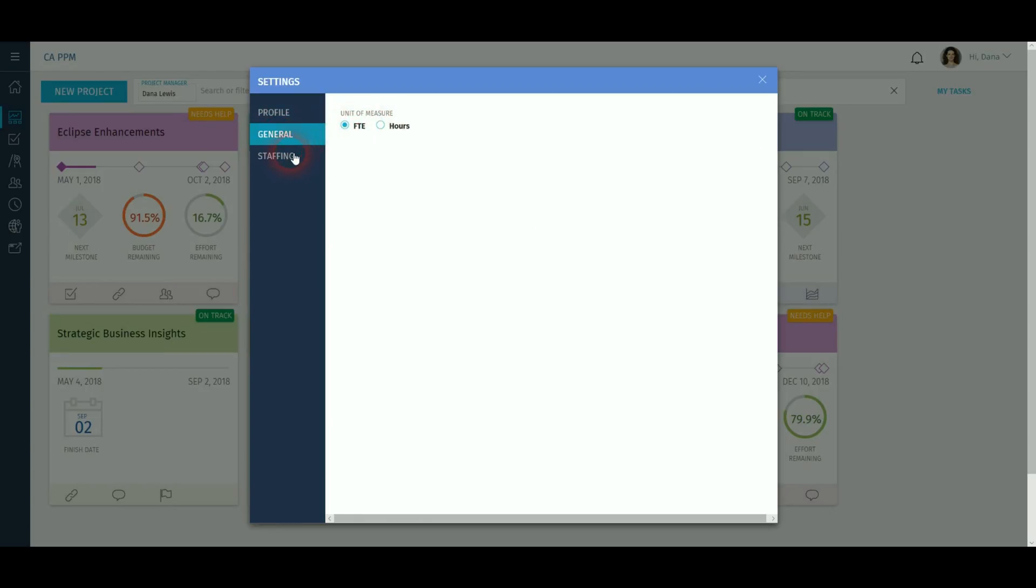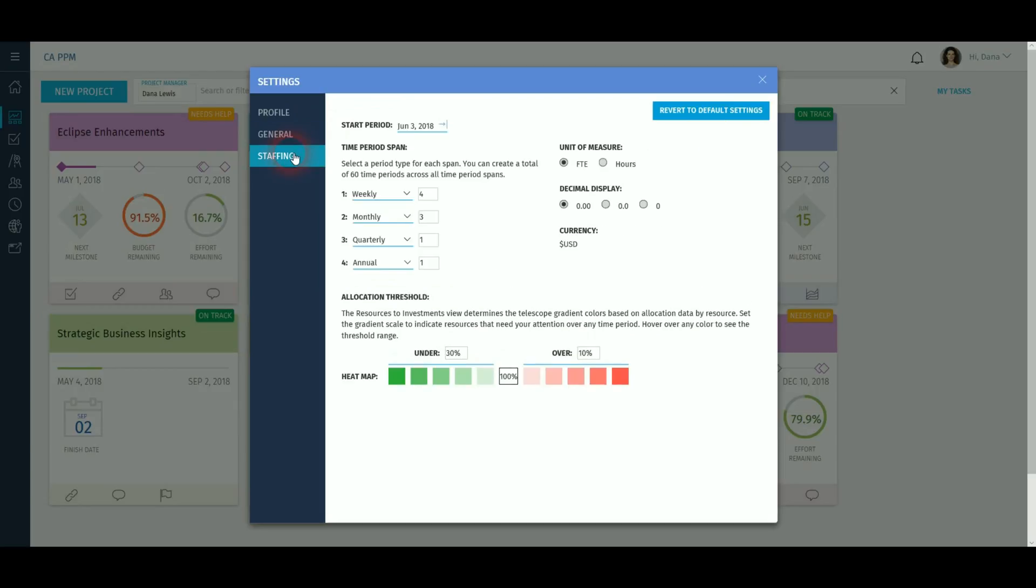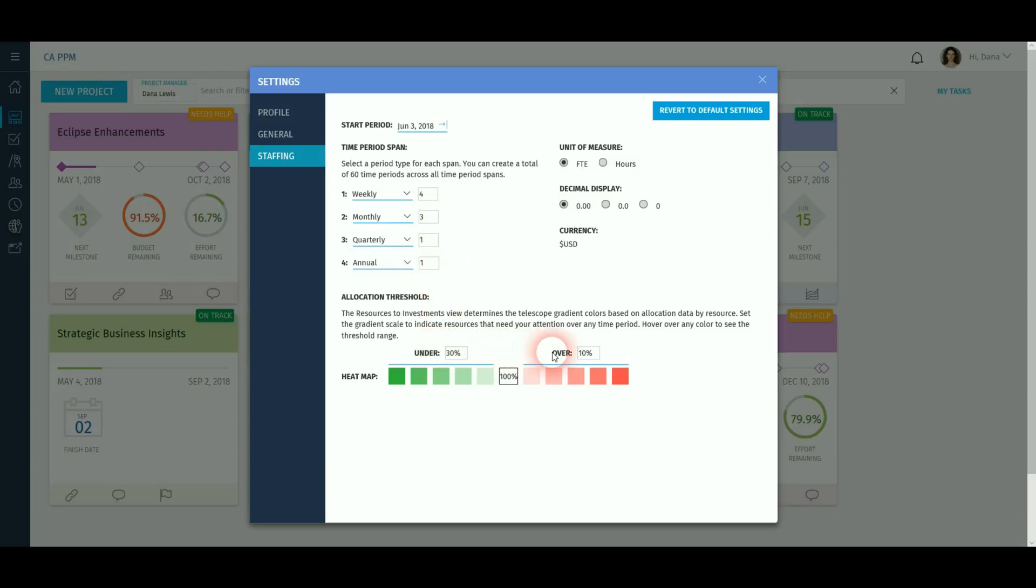If you have access to staffing, you can change settings here, including the start period for viewable rows, the unit of measure FTE or hours, numerical precision, span of time periods for telescope functionality and thresholds for showing under and over allocation. This is covered in more detail in a separate resource management video.